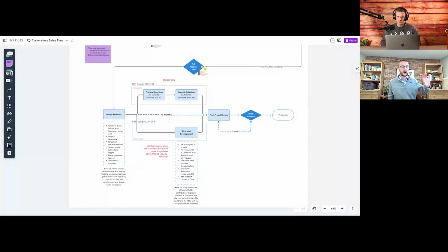This is another thing about using Render early on in the process. We always thought that for our initial concepts, we needed to measure that 1/8 of an inch because we needed to be so spot on. But when we started to do the low fidelity designs up front, there was some forgiveness in what we were delivering. We weren't saying that they were going to get a trash can on the left or the right of the sink, right? We need to make sure that the sink placement is going to be exact because 1/2 an inch, 1/4 of an inch can make or break that decision, right? So because we weren't doing that earlier on, we had some more forgiveness.